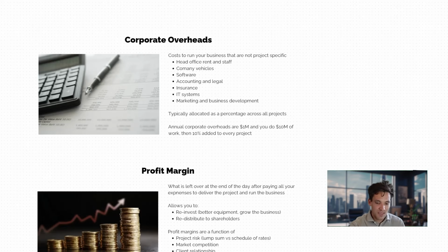On top of that, the other factor that's going to influence profit margin is the market competition. So how many other contractors are out there who can do the exact same work that you're going to be competing against? If there's not many, you can charge a higher price. If there's a lot, you've got to charge a lower price. And then also the relationship you've got with your client. If your client loves you and wants you to do the work, they're probably happy to pay a slight premium to work with you. If you have no relationship with the client, they just see you as contractor A, B, or C, then you obviously don't have the opportunity to increase your profit margin because you're going to be winning the project based on price.